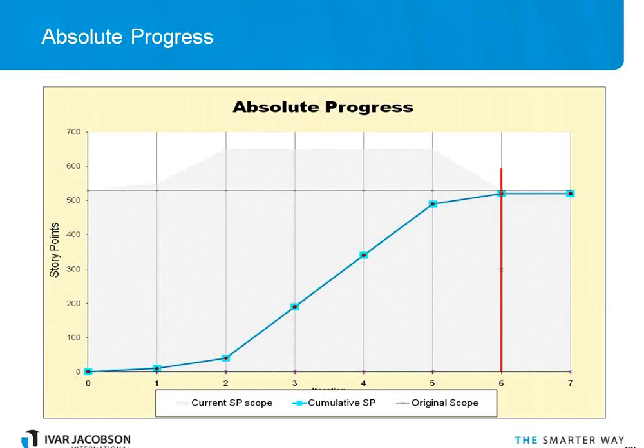So we can track the original scope, which is what we committed, and our current scope, which will often be prone to scope creep. This is very important to look at both those lines and areas on the graph, because a lot of iterative projects get a reputation for descoping, which is untrue. What has actually happened is they've refocused to deliver as much or more than they promised. It's just not necessarily the initial set of requirements. This is part of our ability to embrace change on our iterative project. You could also set some bands for tolerances if you had a sort of a 70%, 30% kind of target setting. Okay, so that's the progress one.